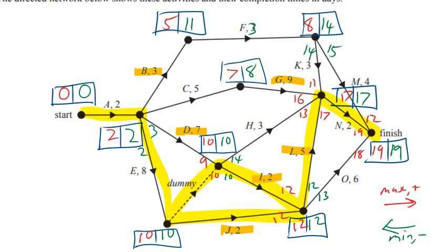So if we look at this, we're probably not going to reduce B because it's nowhere near the critical path. But D and G look a bit suspicious, especially D because we had only one float time. If you look between C and G, there's this 7 and 8 with only one float time. So it's not looking great. Let's have a look at what we can do.